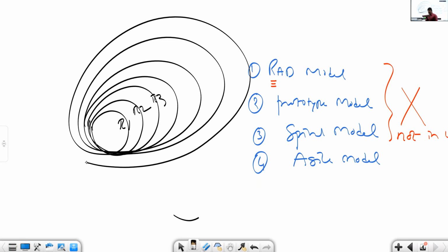Very quick cycles, not lengthy schedules. Requirement by requirement the system gets implemented in very quick cycles, very quick schedules. The flow of activities looks like a spiral net, hence people call it a spiral model. For a project where the requirements are very frequently changing, it is better to plan implementing the system requirement by requirement, not many requirements together.